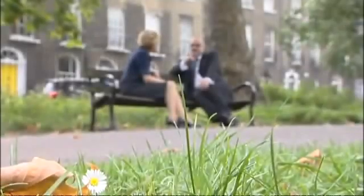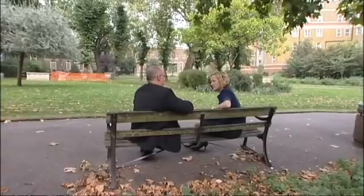This man thinks so. Robert Eyre was a health and safety advisor for Balfour Beatty at the Queen Elizabeth, who left to set up his own company, remedying private finance projects that have come unstuck. One thing needs to be kept in mind is these are self-monitoring contracts. It's a strange phenomenon. The private finance company has to report its deficiencies to the NHS on a monthly basis, and where things are deficient, a deduction in the payments are made. The problem with that is that there's a bit of a disincentive for a PFI company to always be completely transparent. If they tell the whole truth, it's going to cost them a lot of money.